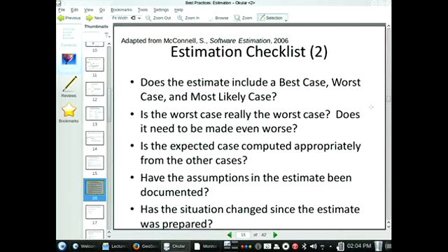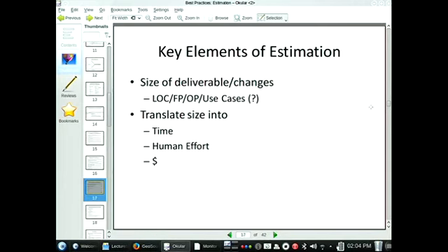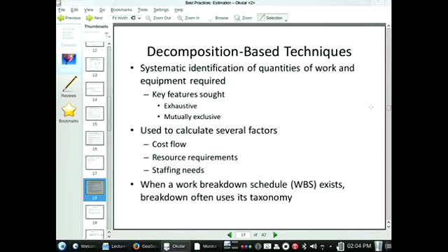So what I'm going to recommend as far as estimates is that you give actually 3 estimates. A range, yes, best and worst case, but also most likely case. And see if you can give estimates that do, in fact, a large fraction of the time, 95% would be great, include the actual value as measured.